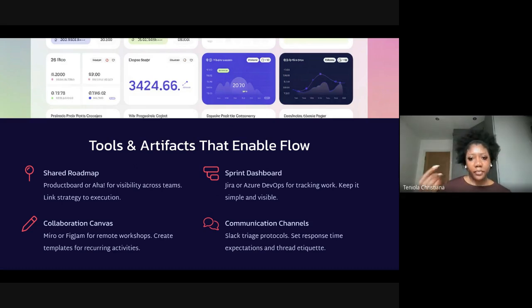As a PM, you go onto your Jira dashboard, you can see how many items are currently in progress, how many items are being reviewed by QA, how many items are done, how many have a bug and maybe are a bit delayed, what's left to do. And obviously using things like Slack and Teams and other sorts of tools to communicate. Sometimes you just jump on a quick huddle.